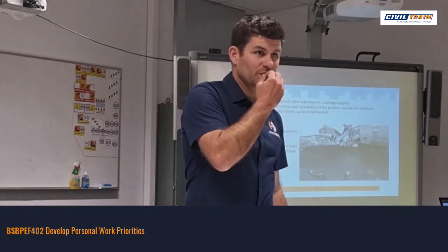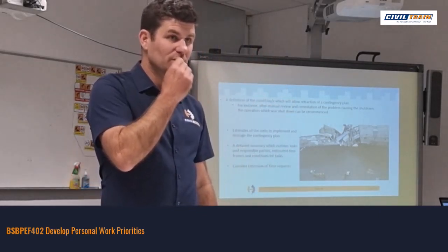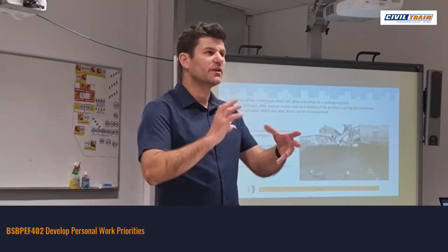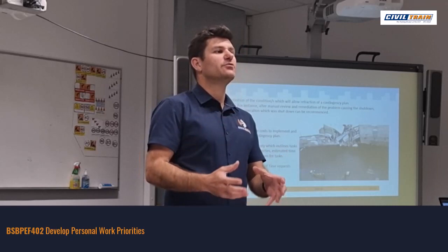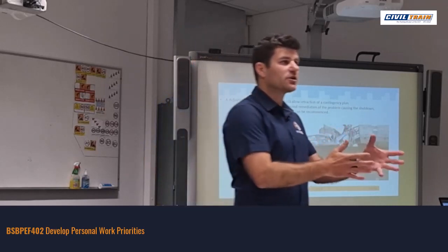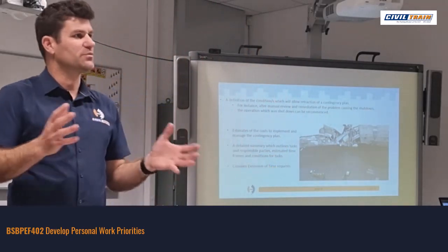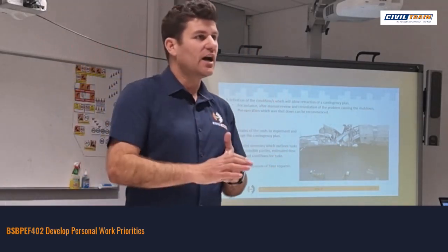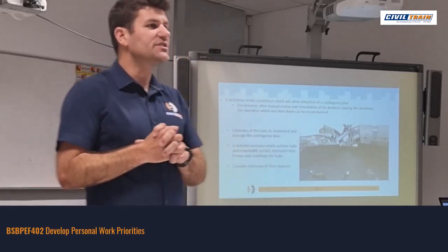Too many people working over each other, depending on what job you're doing. There's no point one digger having 8 blokes spot him. Yep. Trying to catch up by putting more resources into play is not always going to fix that. You might not have the physical materials on site at the time. You might catch up quickly, but then you're waiting on materials, so you can't progress forward. There are a lot of aspects that can cause issues. As you said, too congested. Other activities are dependent on others, so it doesn't happen in time. So it can work and it can't.